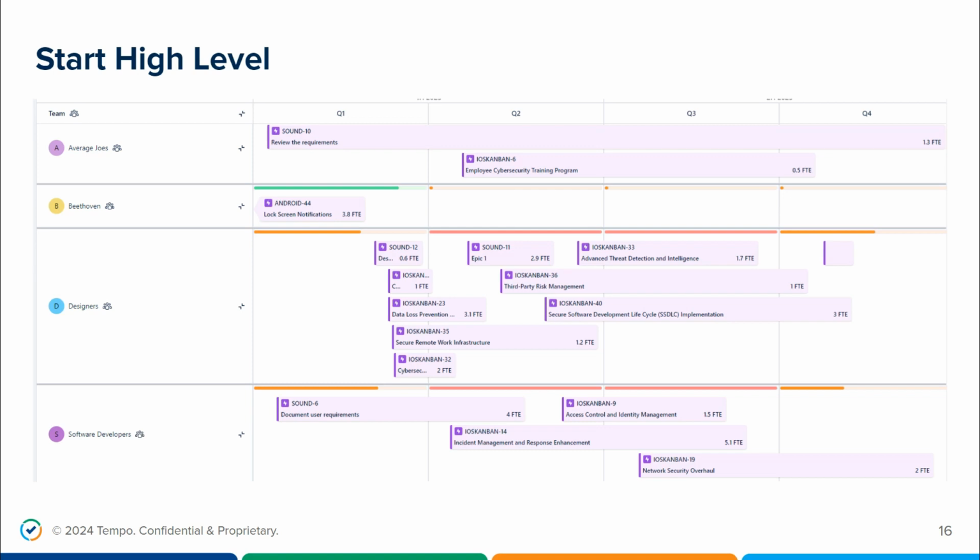Key takeaways from a value proposition there are that you can have teams with schedules that align to their work, especially if you're talking to an international organization. You may have groups of teams that have to work different hours than others. Some countries have stricter regulations about the maximum number of hours that can be worked in a day. So setting all of that in the background is all tied into this capacity management and allowing for us to predict what our output will be once we know what the work will take.